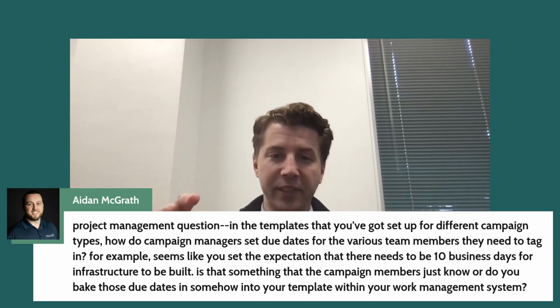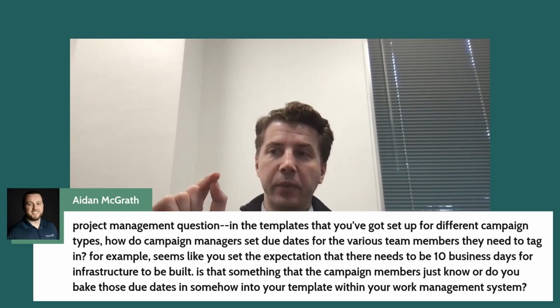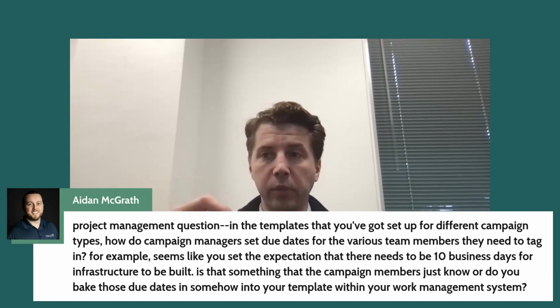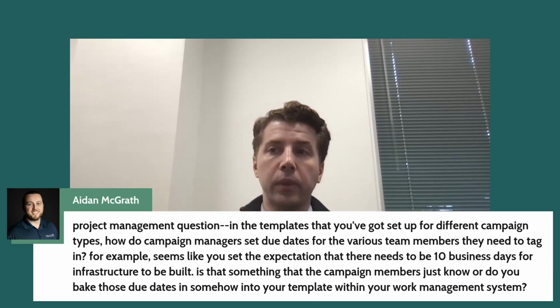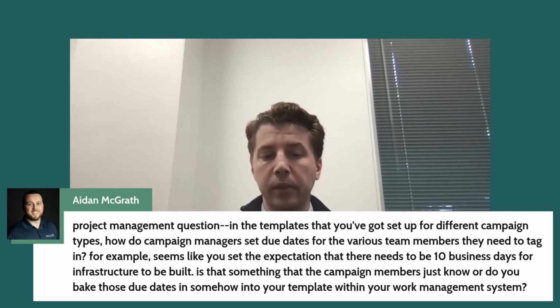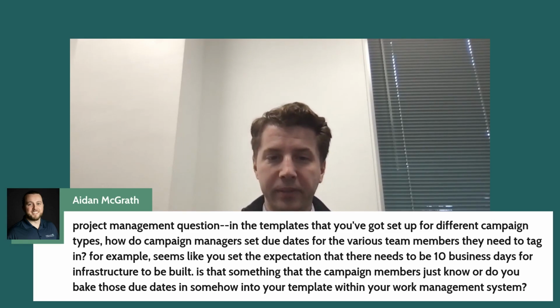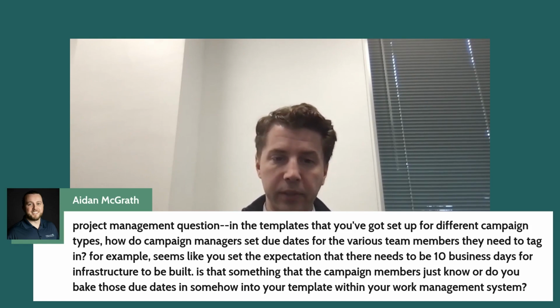Now people can click that in, right? And a campaign manager could say, here's a complex nurture that I need done in 5 days. So that's going to get flagged by the traffic manager, and they're going to ask, well, why are you asking for that? That's inside the SLA. Now, sometimes people don't realize that. Sometimes people need to have a conversation and say, okay, well, I'll have to accept that it's going to take longer. Sometimes there are other questions, and it might just completely change the program. But you can't just accept that, oh yeah, we'll just do it on the due date, because people will just stop respecting the process.